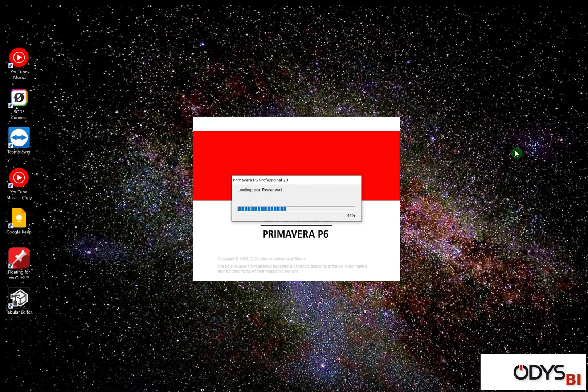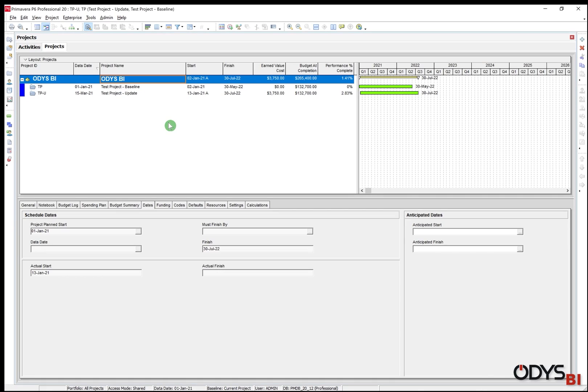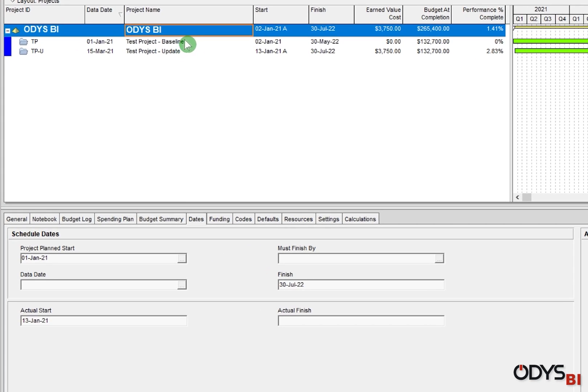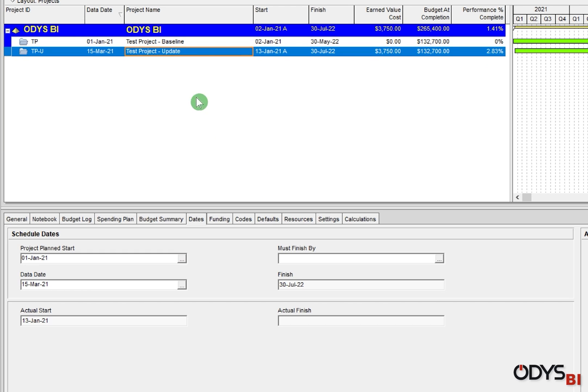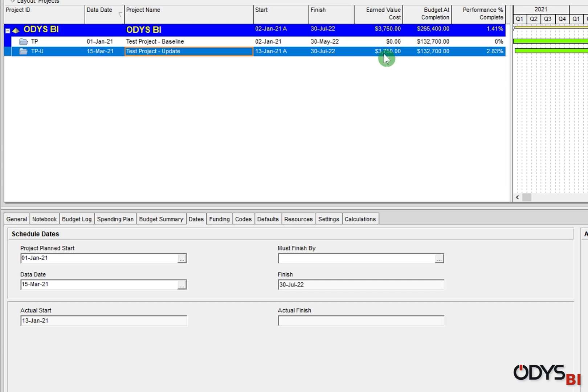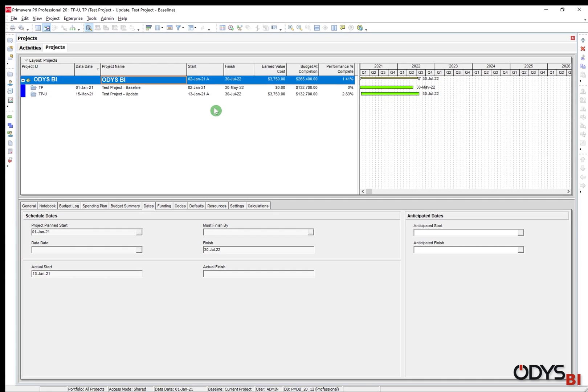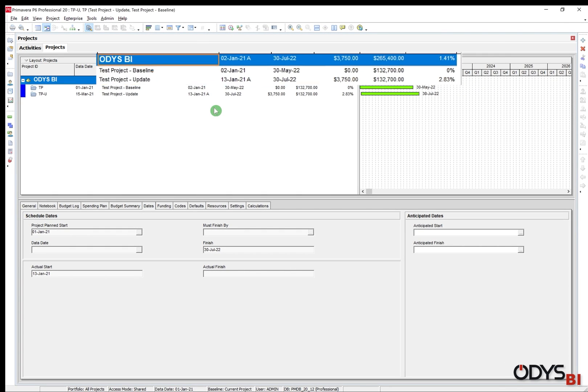Now let's open Primavera. In the project layout, I have two projects. The baseline, data date 1st of January, starting and finish in end of May with earned value zero. This is the total budget and the performance completion is zero. The second one is the update. The data date is 15 of March, starting 13 of January, not 2 of January as planned, expected finish end of July. This is the earned value with performance completion 2.83. Let's take this information to our video tray for later comparison.